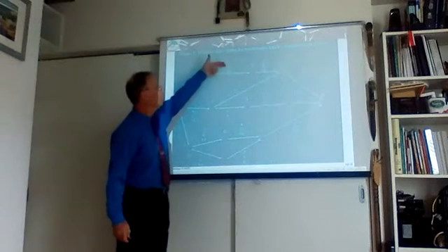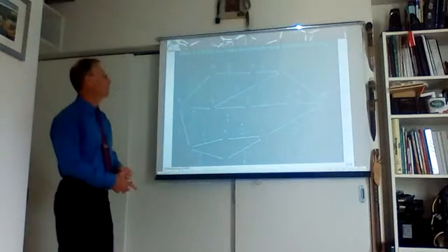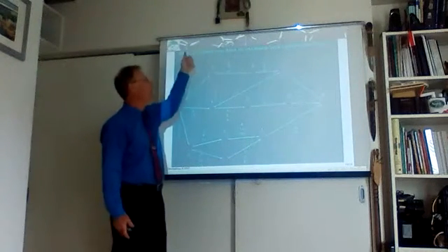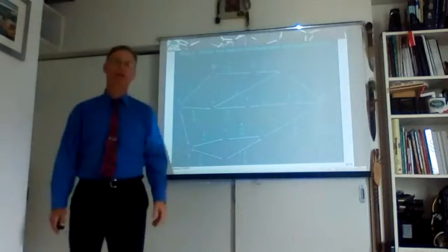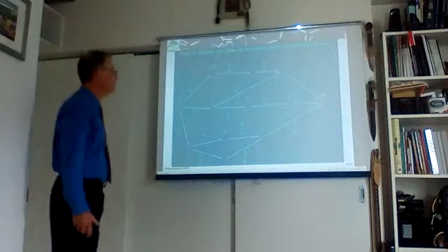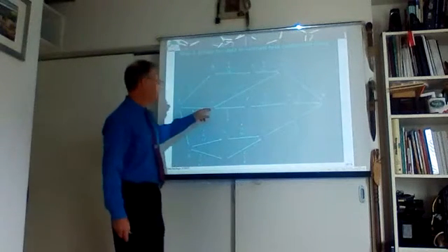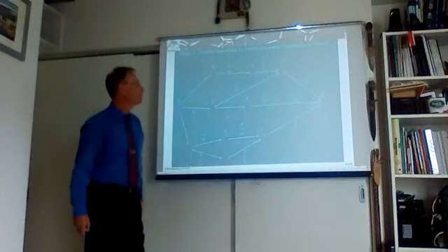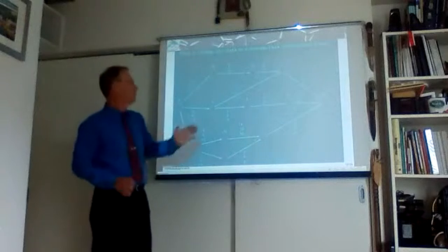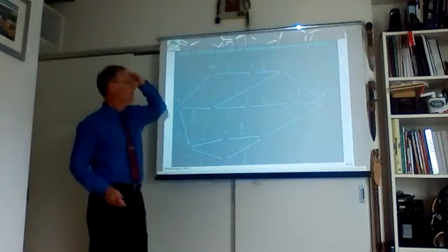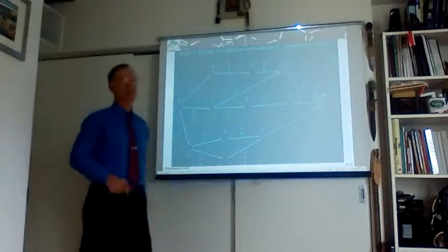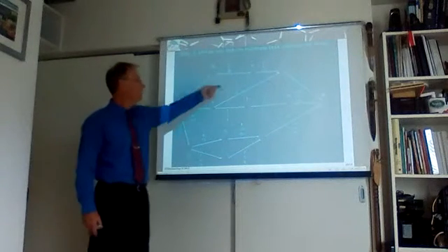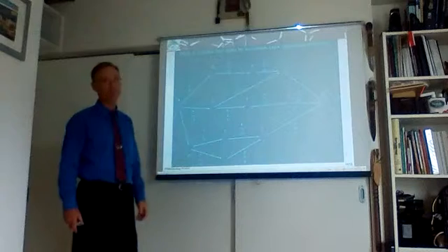So you can see numbers written on each and every task. Each task has the optimistic, the pessimistic, and the most likely time for its completion. For example, the task being done from milestone C to J will be, in the best case, 5 days. In the worst case, 25 days. But from historical reasons, we know that most likely it will take 10 days.